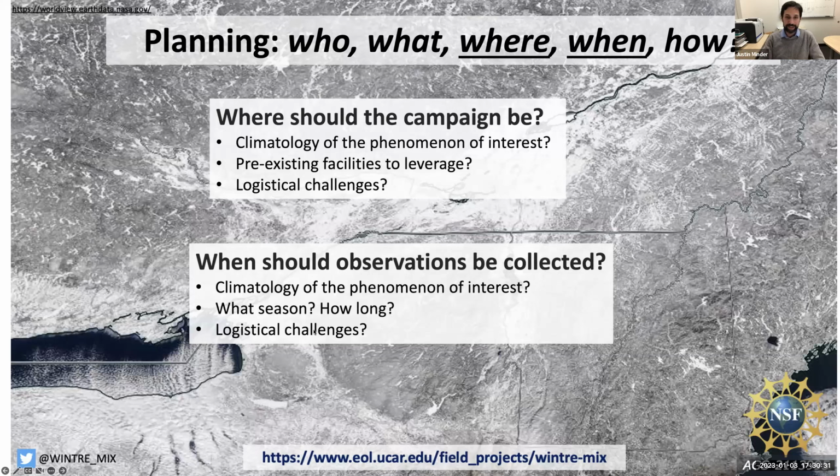And again, thinking about logistical challenges, if you go to certain places in certain times of the year, there might be a lightning hazard that makes it difficult for you to operate your instruments, for instance, or heavy snowstorms that make it hard to get to your field sites. And so you need to take those into account as well.